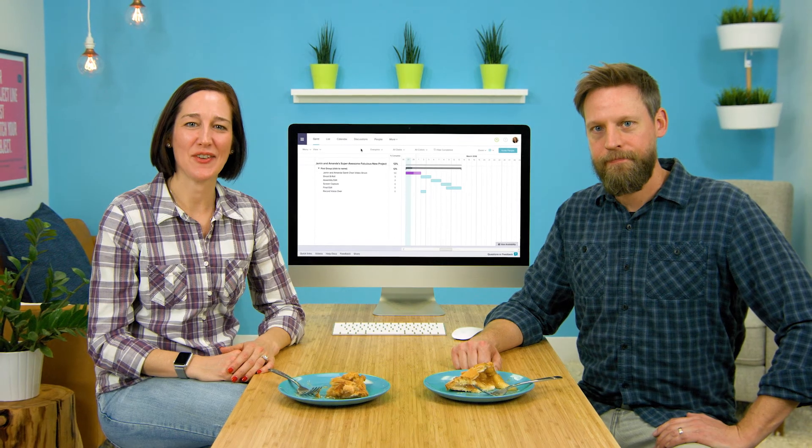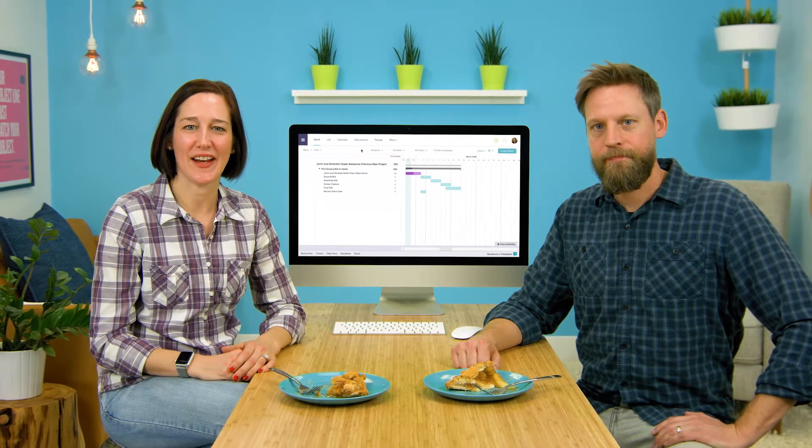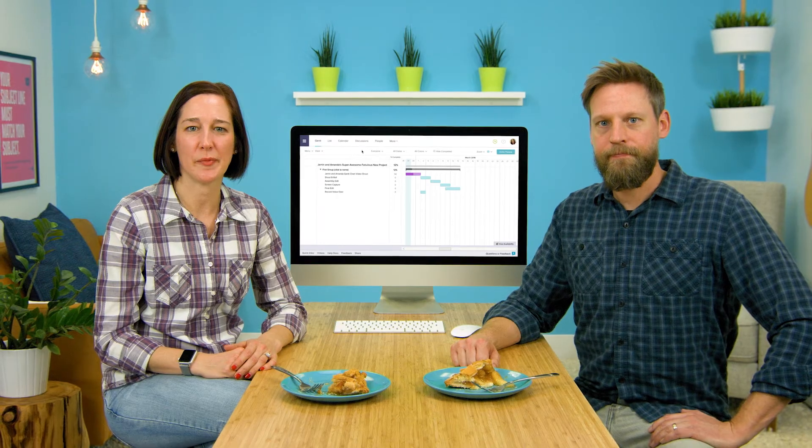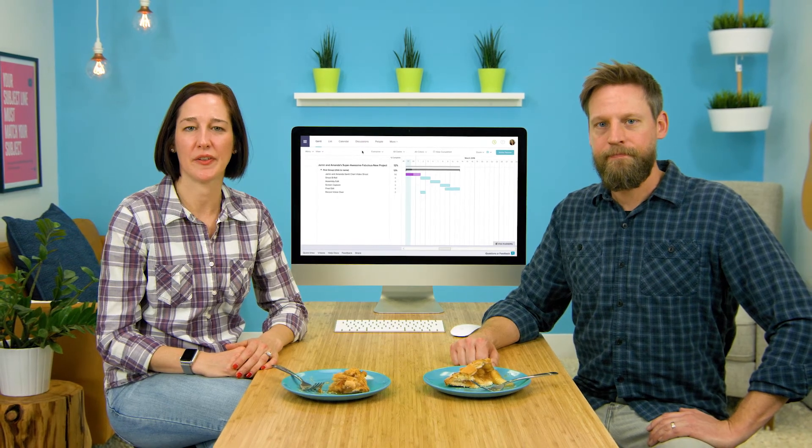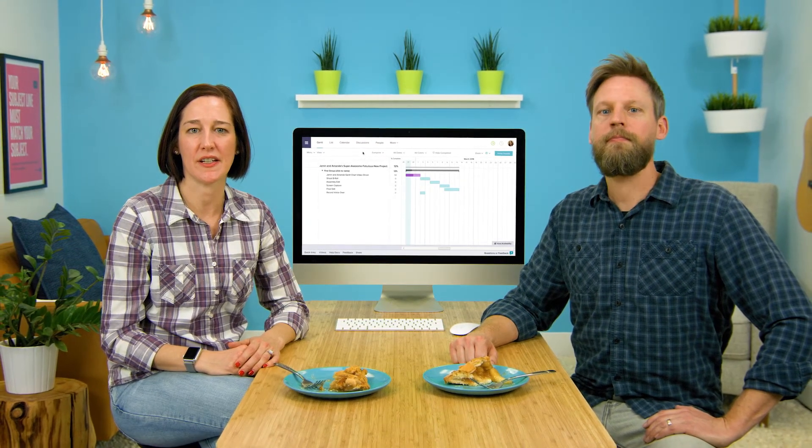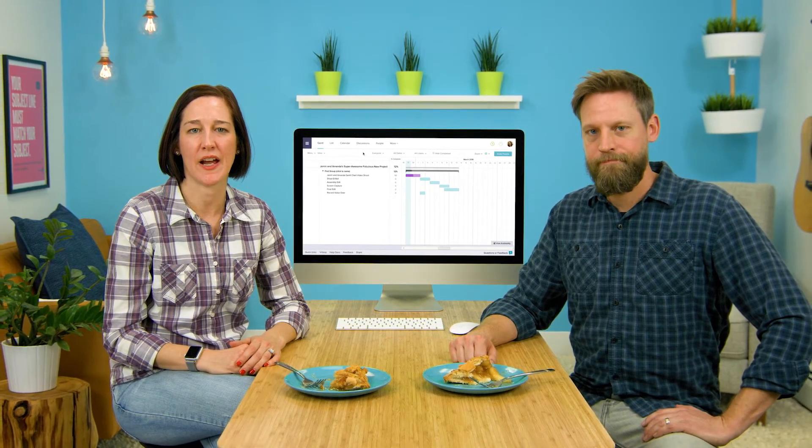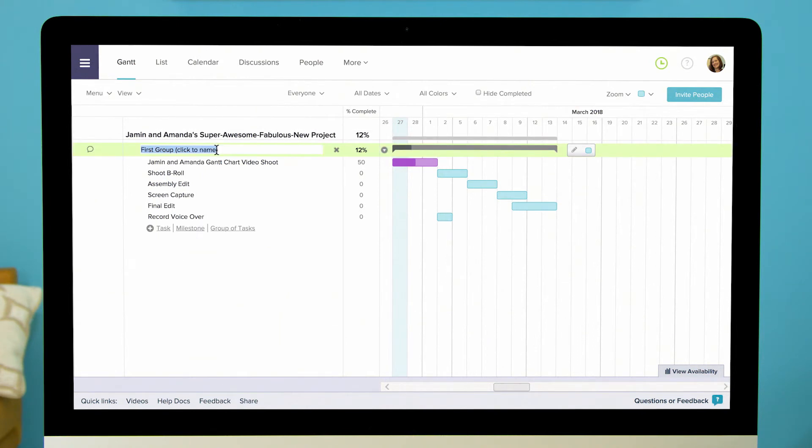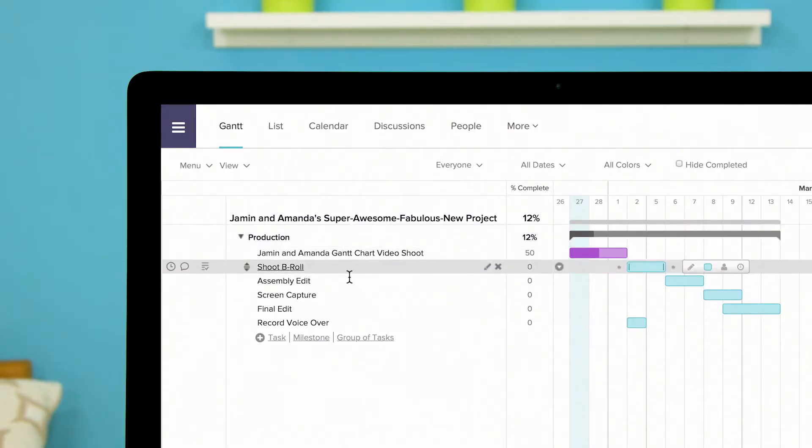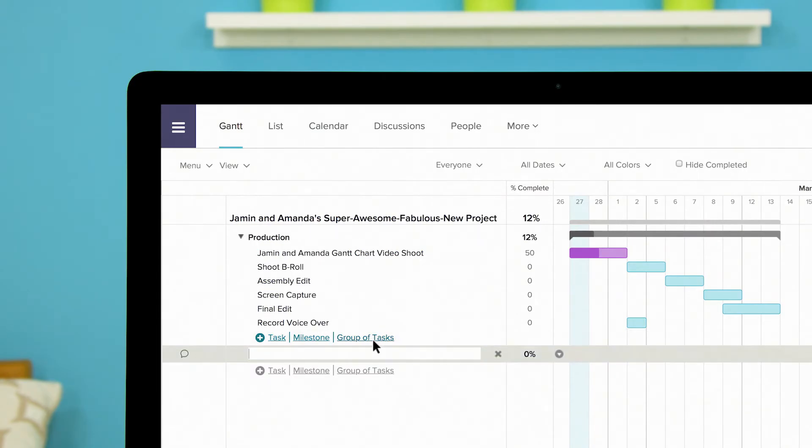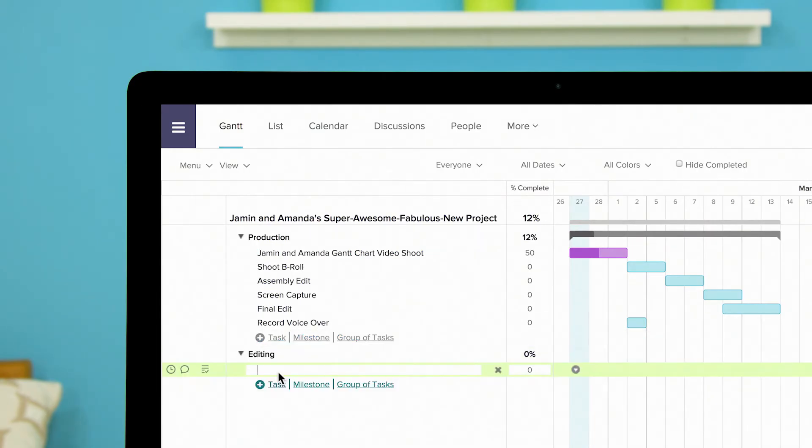Team Gantt allows you to organize your tasks into collapsible subgroups to make it a cinch to arrange and order your project into clean easy to view categories. Your project defaults to having one group automatically in the timeline. You can edit the name of the group the same way you edit a task name. Just click on the group name to rename it. To add new group mouse over the column with your task and group names and click add new group from the options under the bottom task. Name your new group and you can start adding tasks to it.